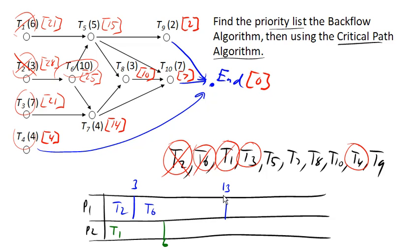So fast forwarding now to time 6. When task 1 gets completed, then let's see here. Anything become ready? No, not yet, right? Because task 5 and task 7 both depend upon task 6. But task 4 is ready,